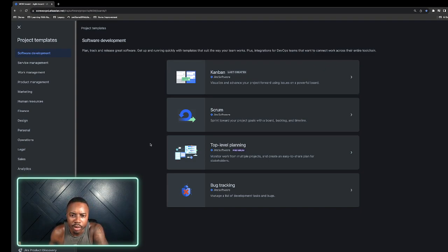So the one that I like to use is Scrum. Scrum comes with a board, which I always do in 2 week increments of sprints, which is just 2 weeks worth of work basically. And all of the 2 weeks worth of work will be present on that board. They have a backlog, which is all of the work that you are not doing right now. So let's say I know I want to work on releasing something for the OCPD coach brand, but it's not something I can do everything in 2 weeks. It's not a project that I can complete in 2 weeks.